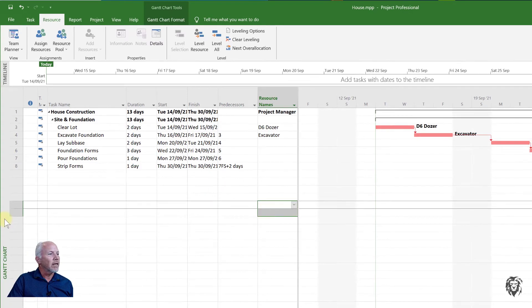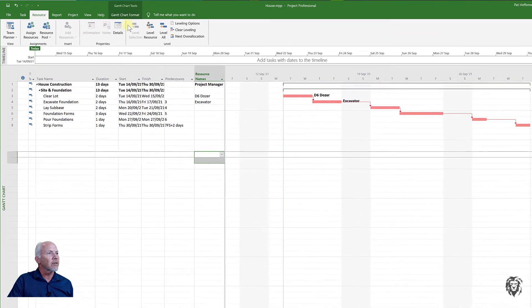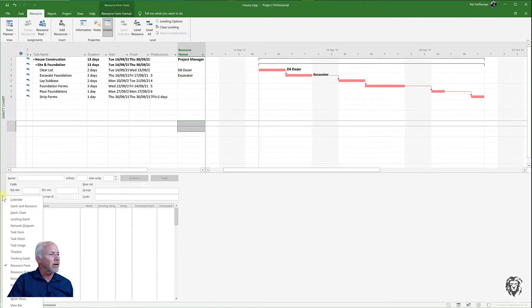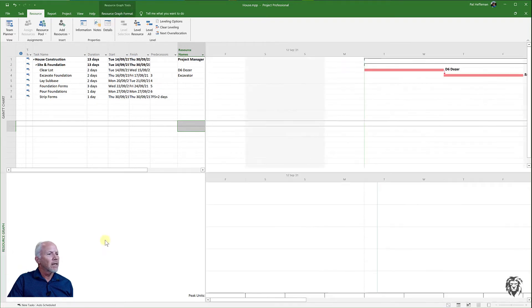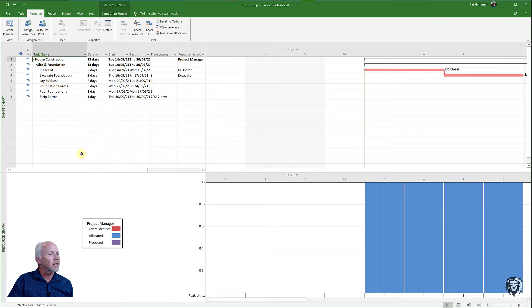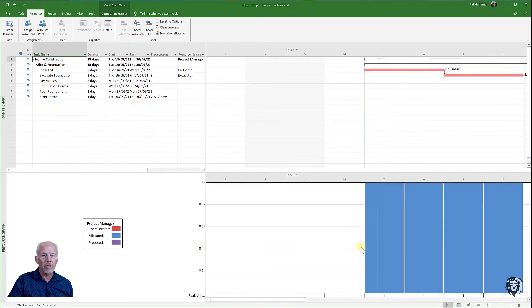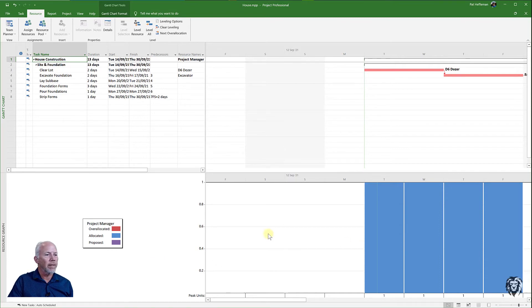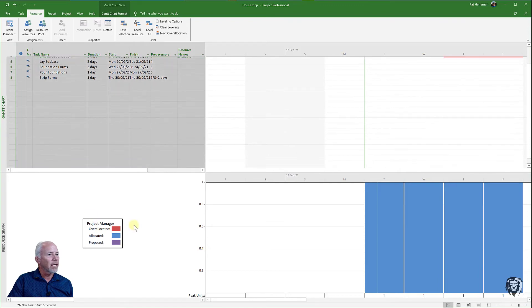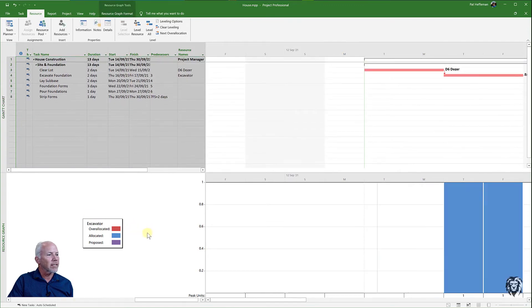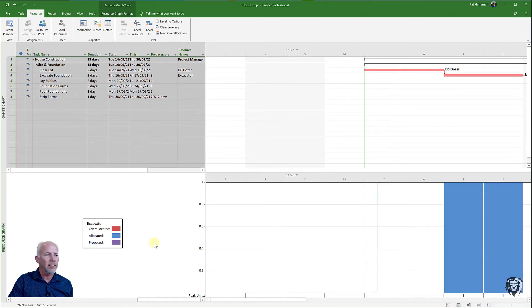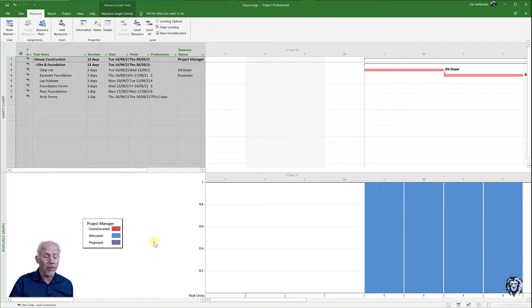If I split my screen to a detail screen, down here I'm going to use my resource graphs. If I cycle through my resource graphs you can see the resources are showing up and where they're being used and not being used. I can cycle through them and see that the project manager, the D6 bulldozer and the excavator are all being used to their full capacity on the days where those tasks are.